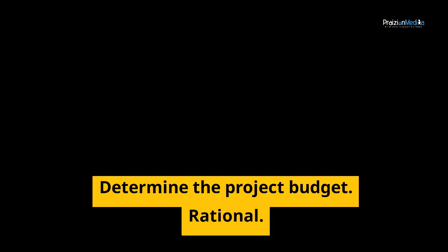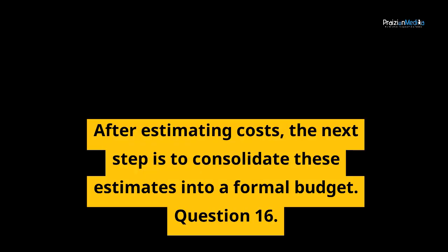Correct answer A. Determine the project budget. Rationale. After estimating costs, the next step is to consolidate these estimates into a formal budget. Question 16.